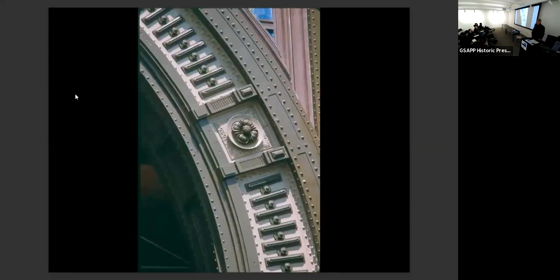One thing I urge you to do when you start any large cast iron project is establish a glossary up front. So we had numbers for everything, but when you got the guys working in the field, they're not going to say that these pieces are A1 or 6. The guys in the field say, hey, Pieper, we're missing 3 Twinkies on box number 3. And then we also got a donut. We needed a donut. So establish an informal glossary. Yes, the numbering system is important, but the glossary will come in handy with the guys when you're talking about certain things in the field.